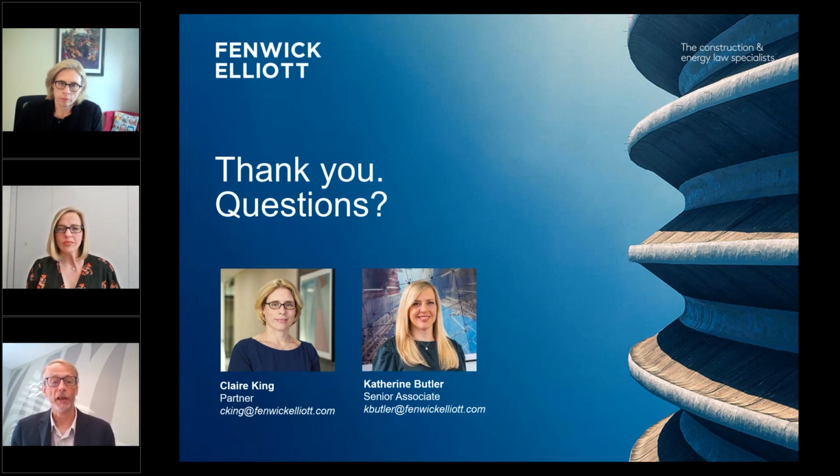But apart from that, FIDIC has, in very general terms, similar processes, with a statement of completion after taking over, and then a final statement process. One thing FIDIC does, which I think is slightly different, is have something called a partially agreed final statement, where the parties are under obligation to agree everything they agree, and then hopefully have a very small number of disagreed items, which can more easily be resolved through some kind of dispute resolution or dispute avoidance process, therefore avoiding arbitration. But as I say, that's probably a webinar in its own right.